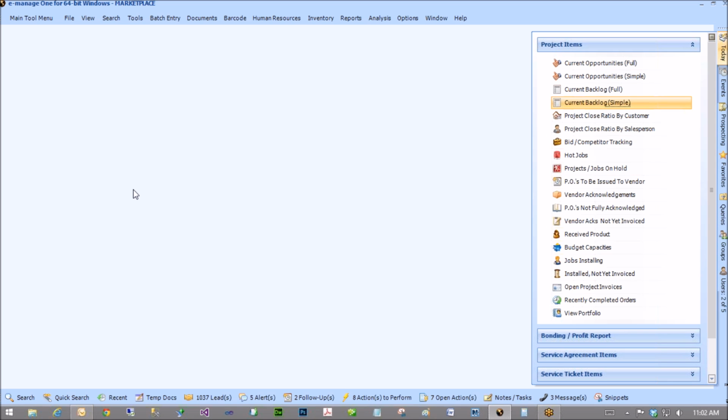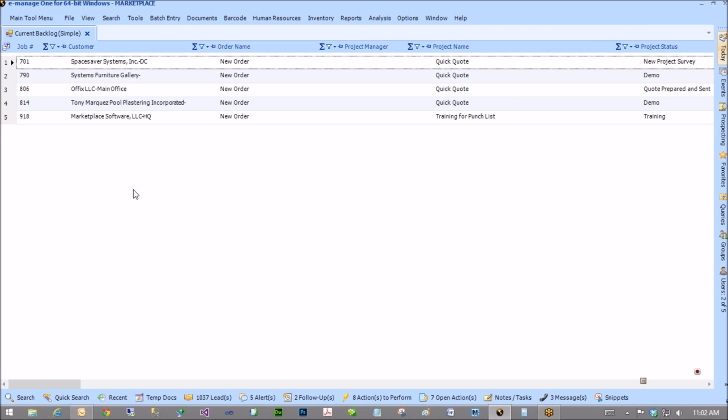I'm just going to go in there really quick and show you the backlog and talk about that for a second. So anything that is zero sale price, and that zero sale price can be from either everything being zero, all the line items being 100% customer discount, or by having no items on it, is going to show up on your current backlog.